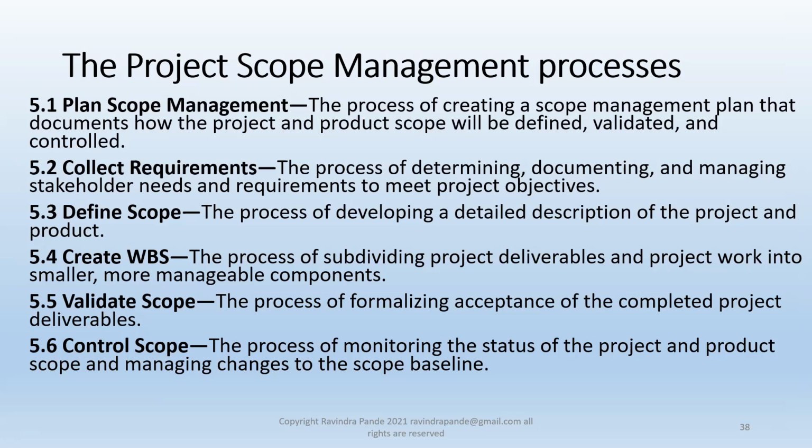The 6-hour benchmark is because according to the PMI, or the Project Management Institute, the work plan for a day is for 6 hours. The rest of the 2 hours are for meetings, lunch, and whatnot activities you normally have in a given organization. So 6 productive hours are normally planned, and that's why that 6-hour benchmark. Okay, and we'll basically discuss this in depth whenever we do the create WBS hands-on workshop as well.